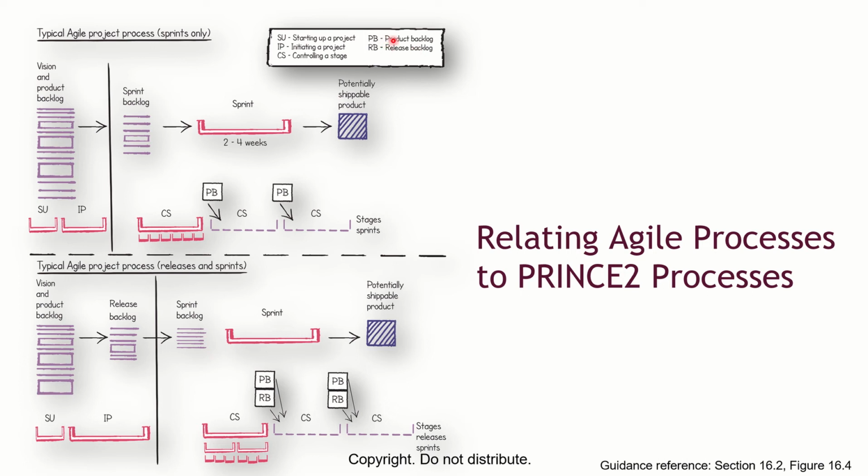So product backlog is the list of all the activities you want to do to achieve the vision. All the things you want to do for a 3 years building plan you have, or you want to build an e-commerce website that will have artificial intelligence, machine learning, all the nice things to have, that is the product backlog. Then you break it down to what you can achieve, and that is the sprint backlog.